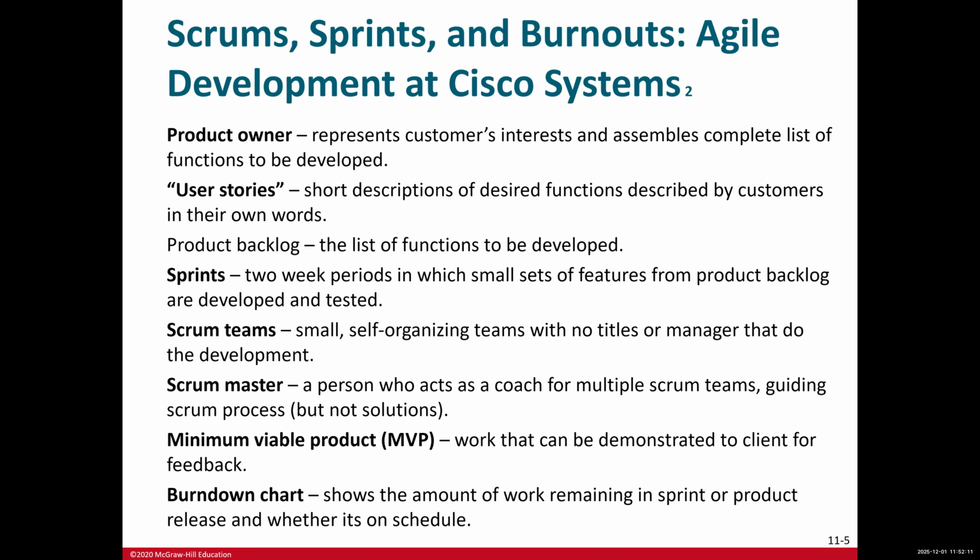And typically, it just tracks work left over time. As work is completed, the chart shows that. It actually burns down, giving the team and all the stakeholders a very clear visual picture of progress. So these are different elements if you're interested in a Scrum framework.